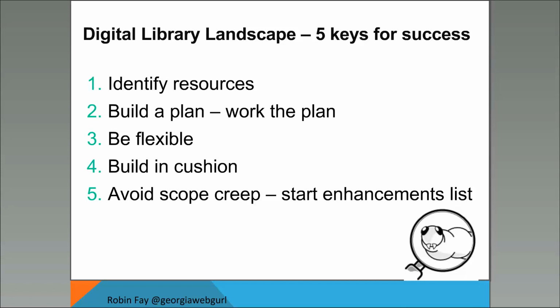Build in a cushion. Projects always take longer. If you're going to actually do a project like this, it is always going to take longer, I would say at least twice as long as what you think it's going to take. I will have to admit I've been woefully bad about underestimating my time, and then I end up working like 18 hours a day to sometimes finish these sorts of projects.